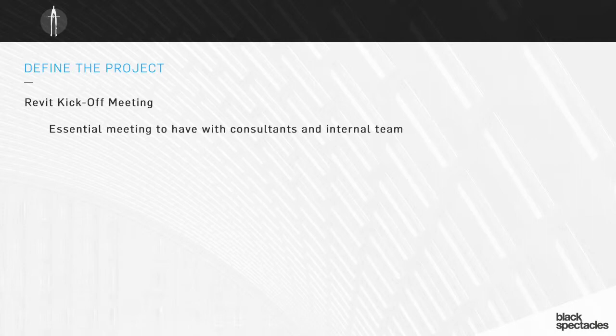Before you do any work in Revit, you need to have what's called a Revit kickoff meeting. This is where all of the team members — both your internal team, all the people in your office, and all of the consultants like the structural engineer and the mechanical engineer — everyone working on the project comes together. Even consultants working in CAD should be included, since they'll be interfacing with those using Revit. Everyone involved should discuss what they're responsible for, how to coordinate models, and what is expected of each team member.